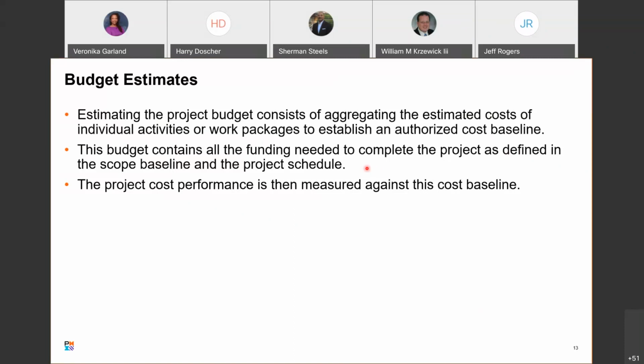We've moved to a different budgeting technique when working with agile and SAFe efforts. It really requires a fairly consistent number of people working on delivering value or features over an extended period of time, say a year, so that you really fund the people that are working rather than funding the project effort itself.